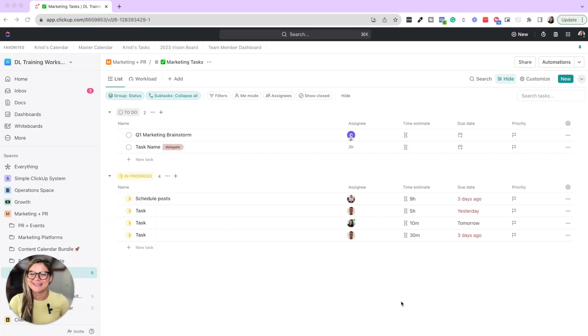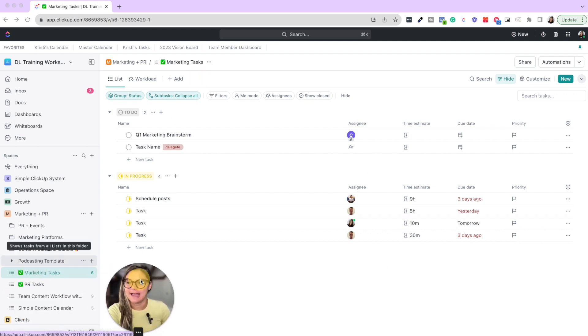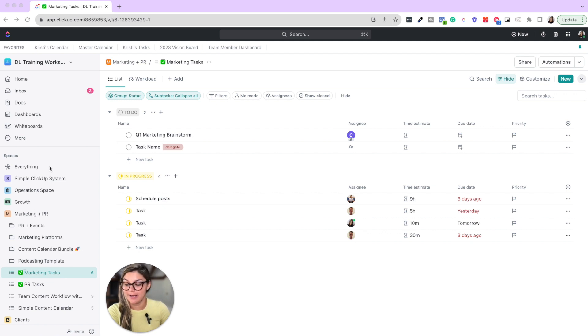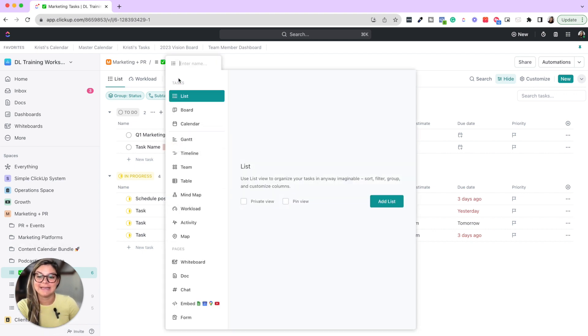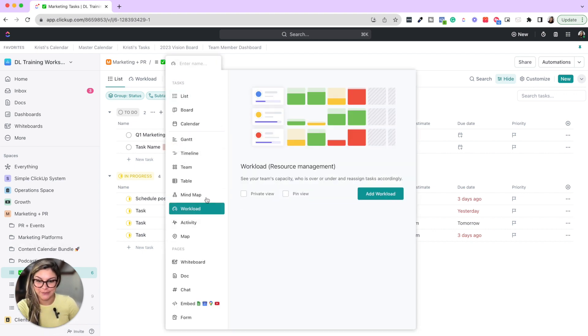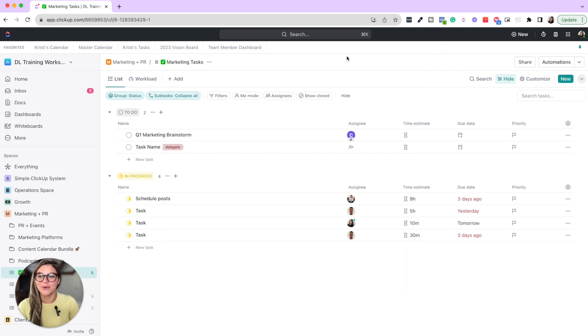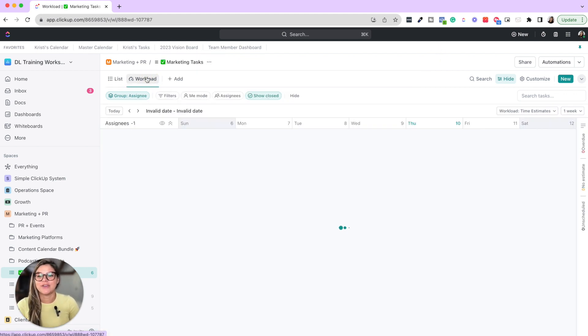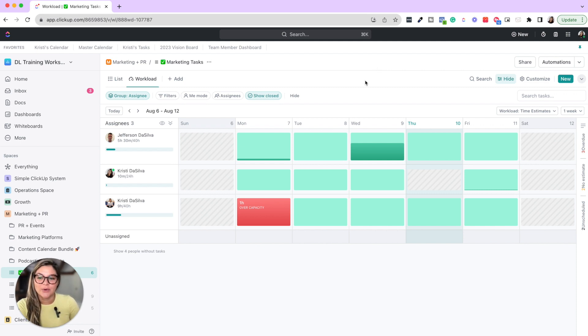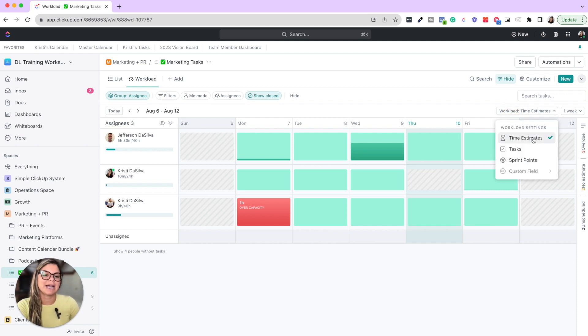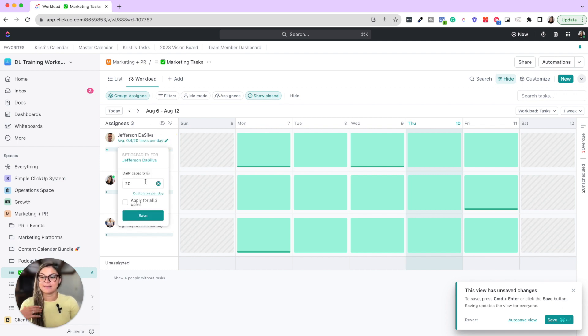Tip number three when it comes to delegating in ClickUp is utilizing workload view. If you're not familiar with workload view, this is on any level. You could do this on the list, folder, space or everything level. You can add a workload view that is going to allow you to see your team's capacity, who is over or under, and reassign tasks accordingly.